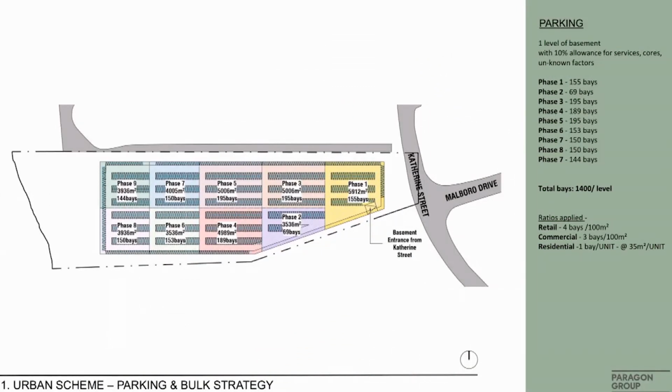And so the way we design the scheme financially, and these are architectural devices that we need to work with our developers, is to make sure that when we design, the opportunities to actually see these projects coming to fruition are realistic. So we've taken the scheme and broken it down into 9 blocks, and each block is 10,000 square meters, and we've built in specific parking that relates to those areas in terms of the top structure above. And so they're bite-sized chunks that you can develop from the active street all the way down to the river, and build active courtyards and urban environments from day one.